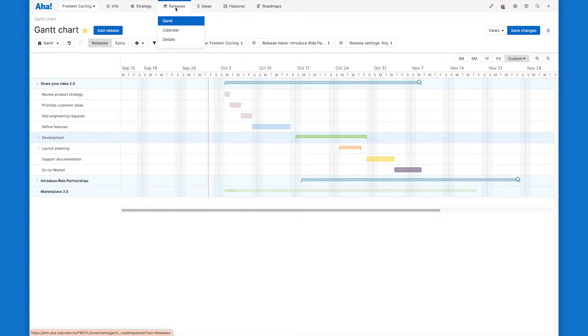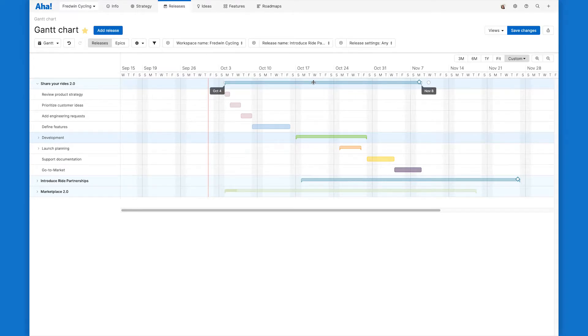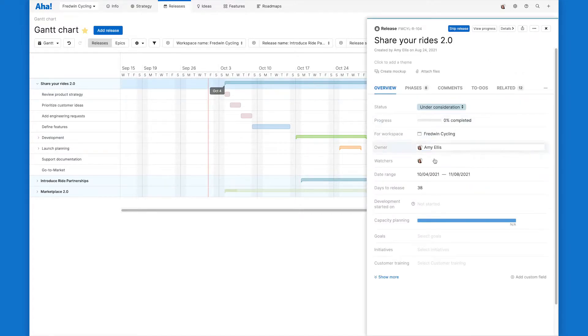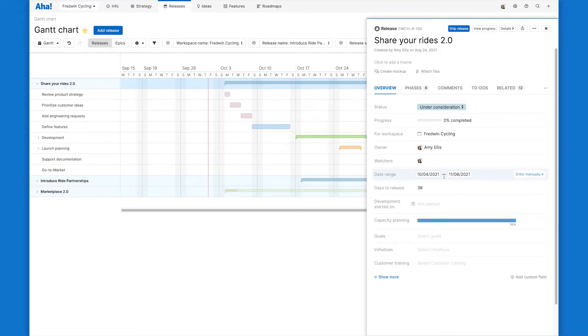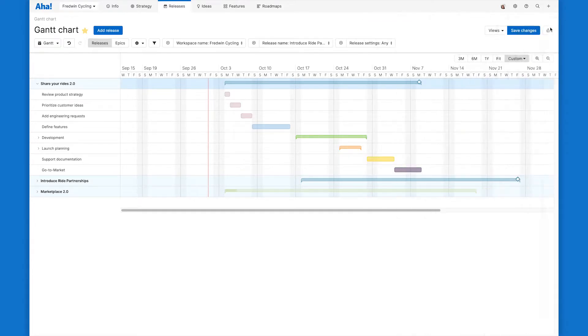Now, let's take a look at the releases that are already built out on our Gantt chart here so I can show you how to set and manage dates. You can see when I hover over the release bar, the start and end dates are visible. I can click into the release record to see those same start and end dates here in the date range. These dates determine the position of the release bar on the Gantt chart. I can change them here on the record or on the Gantt chart itself.